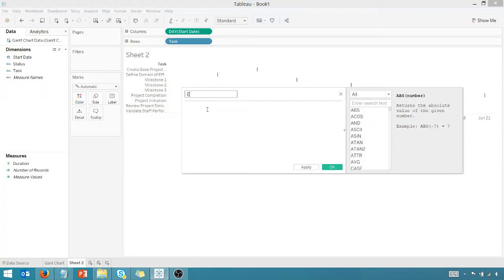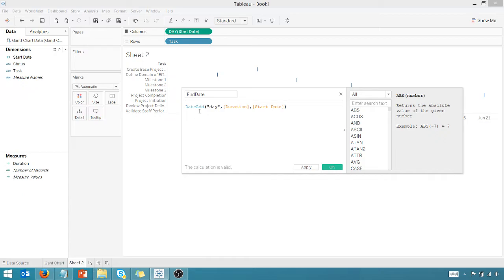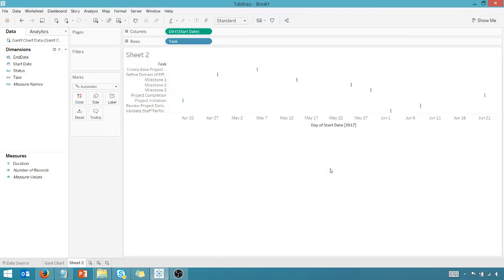So this is going to be the end date. It's going to be helpful in our tooltip. And this is the calculation. We're going to use the date add function to add a day. The duration is essentially in days. We're going to add that to the start date. So we're going to say OK there.